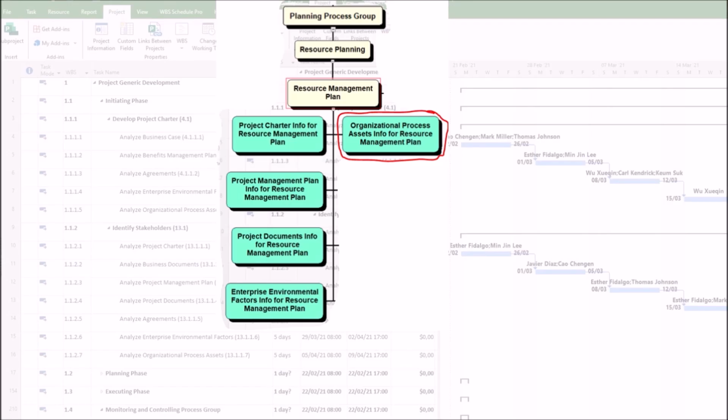Here's a breakdown of why organizational process assets are so crucial, with specific examples. 1. They provide templates and standardized frameworks. Organizational process assets save immense time and ensure consistency across projects. For example, instead of creating a RACI chart from scratch, a project manager can pull a standardized RACI matrix template from the organizational knowledge base. They might also have access to predefined role descriptions, competency frameworks, and team charter templates.